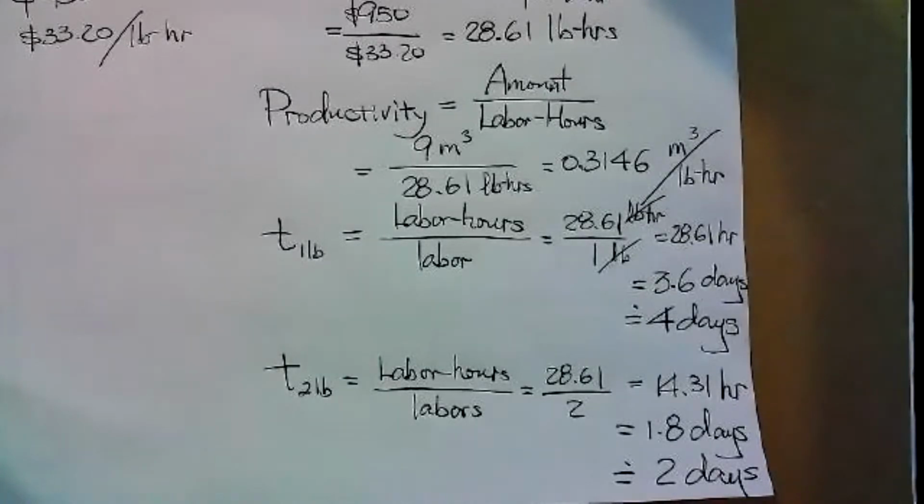Standard, okay, yeah, standard 8 hour working day. If it's not like that, I need to specifically tell you this is a 10 hour working day. If this is not pointed out, then that's standard 8 hour working day. Okay. Thank you. No problem.